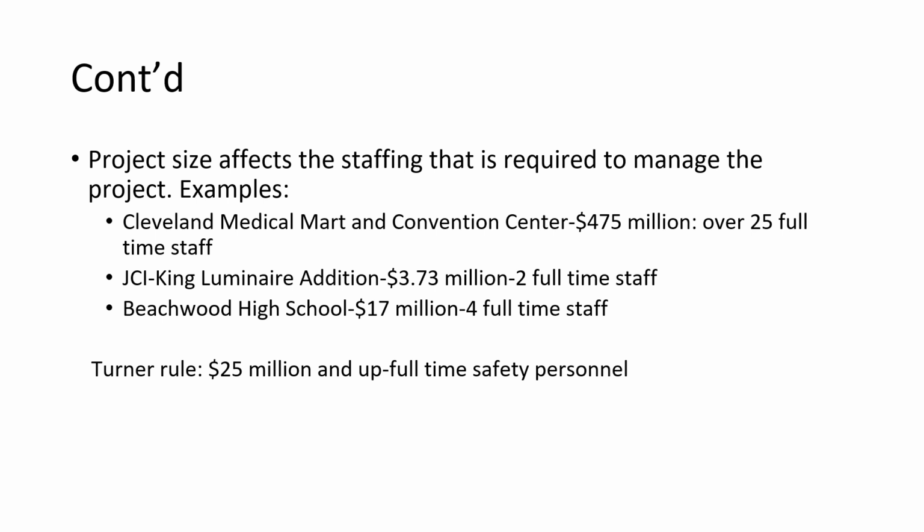Project size, again, affects staffing. Cleveland Medical Mart, $475 million, over 25 full-time staff. JCI, that project, and the reason I say two, I just told you one before, it was me and an intern, and I had him for a couple months. All right, Beechwood High School was only $17 million, had 4 full-time staff. Scope was small, or project size was small. Scope was really unique. Turner's got a rule, $25 million and up, full-time safety personnel.